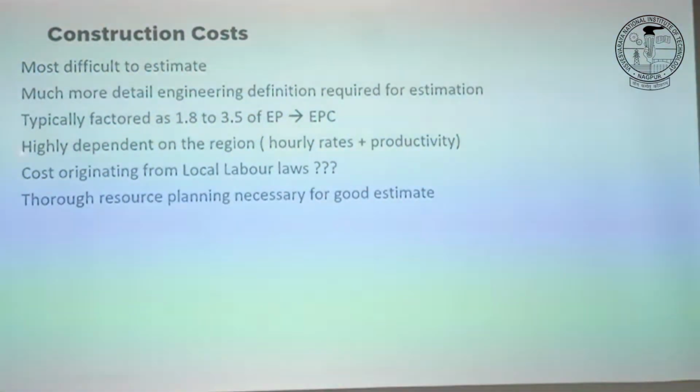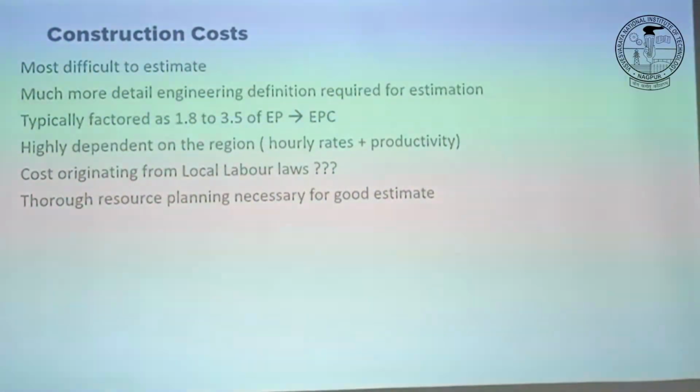So example within the chemical plant could be a compressor, which generally is supplied as totally engineered on a skid. All what you have to do, they will send you the drawings and say, please prepare a cemented or a concrete structure of this length and width, and with 4 holes for the screws, and they will send you the whole system, and you just have to put 4 screws and you are done.